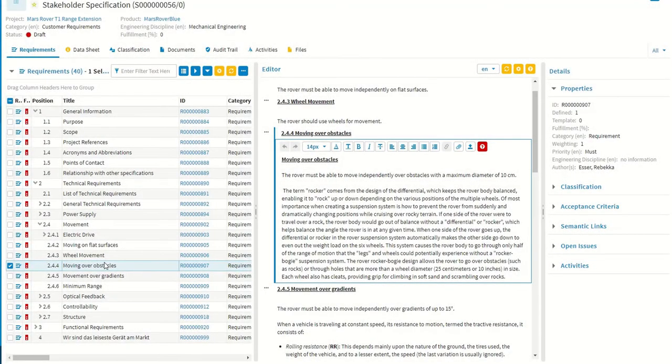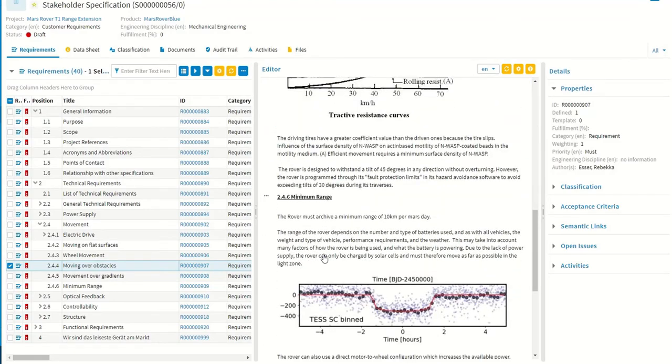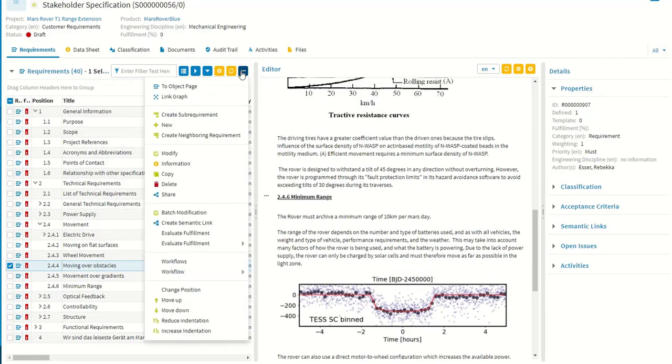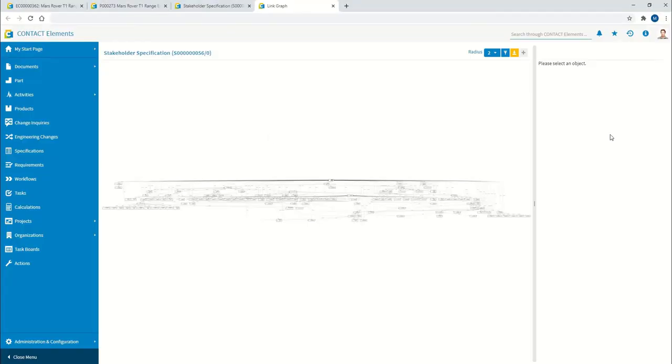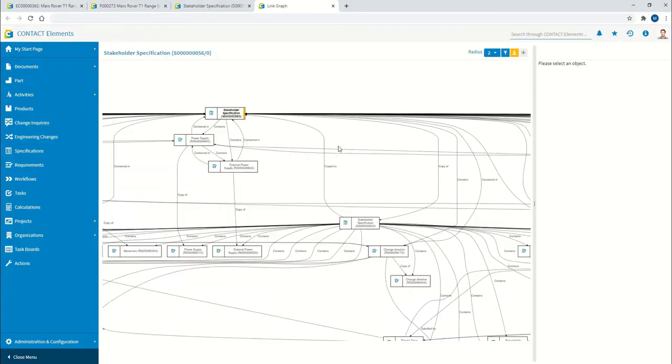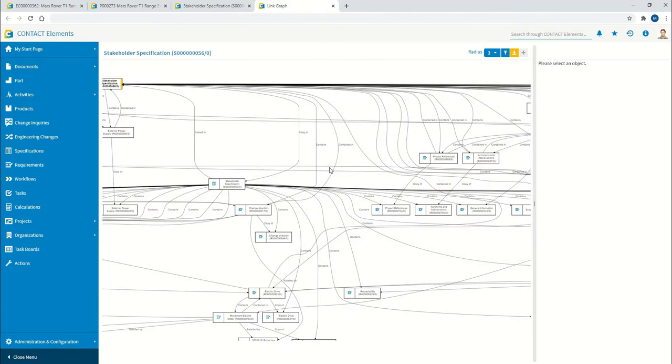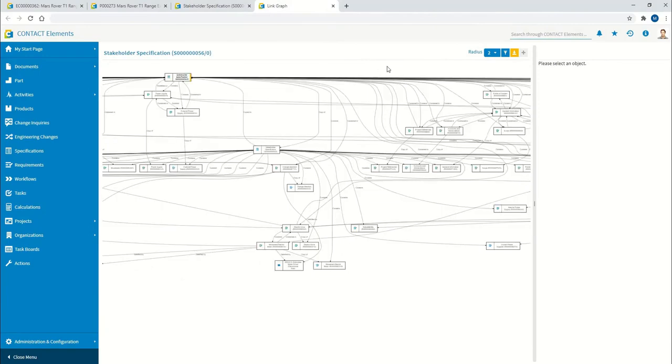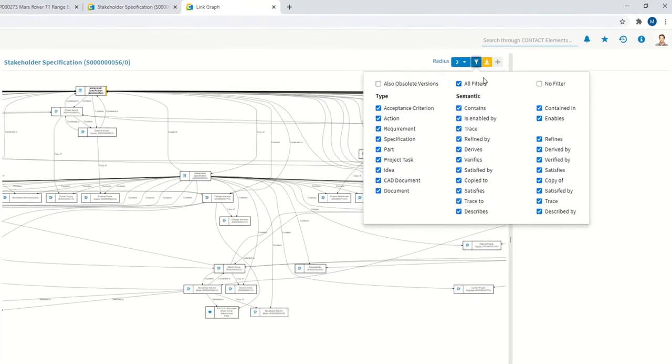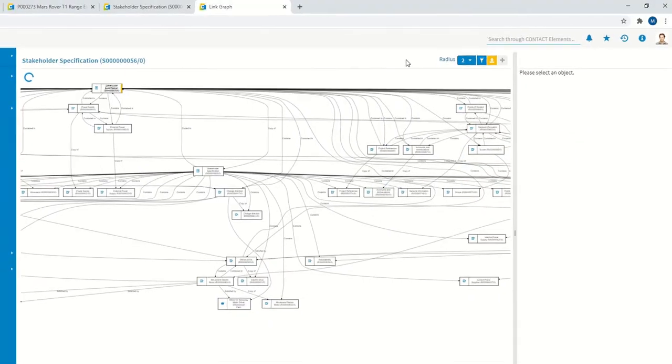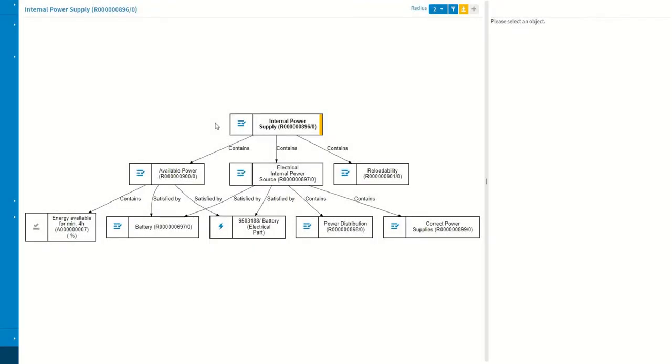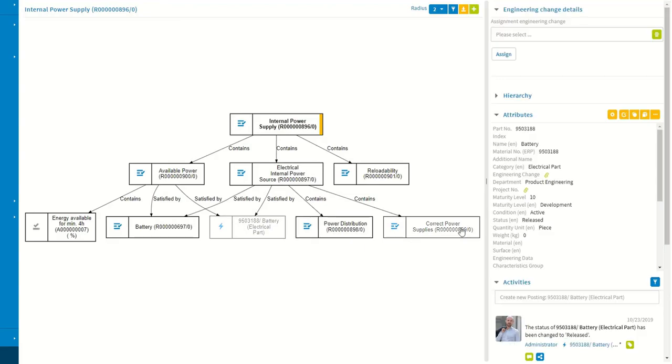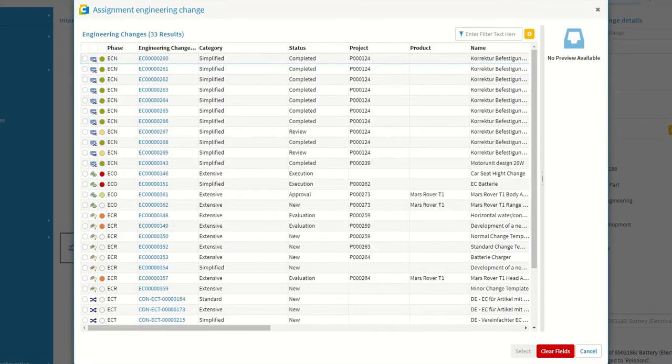The starting point in the example project is identifying the customer requirements to be changed in the customer specification. Direct access to the link graph is possible from here. Filter functions based on semantics and radii within the graph ensure that the graph remains easy to understand. If information objects that need to be checked are found, they can be integrated directly into the change folder.